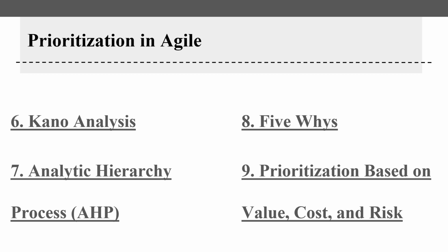Eighth, we have the 5 whys. Stakeholders often express a desire to implement a feature driven by reasons that may not align with logical arguments or the best interest of the company. Utilizing the 5 whys method, the analyst systematically questions the stakeholders about the necessity of the demand, repeating the why inquiry up to 5 times or less.